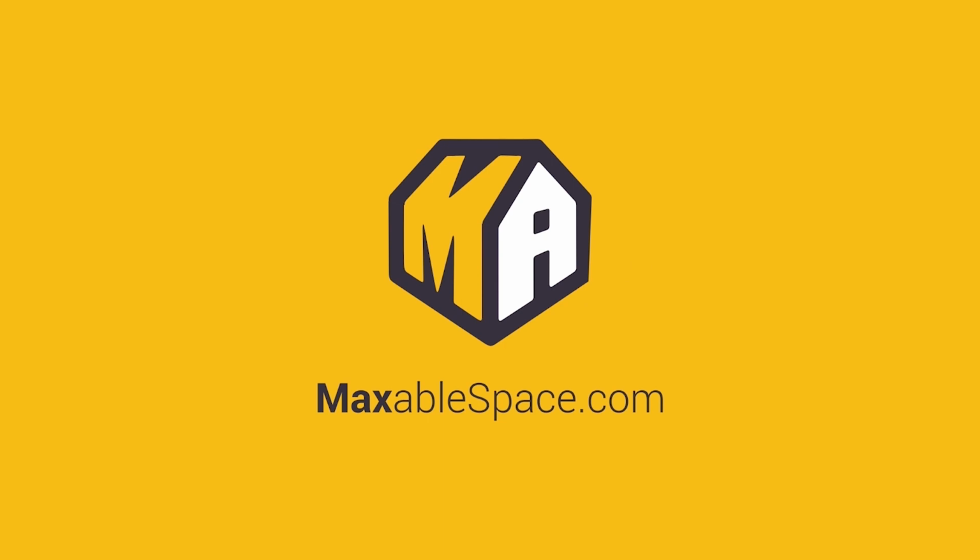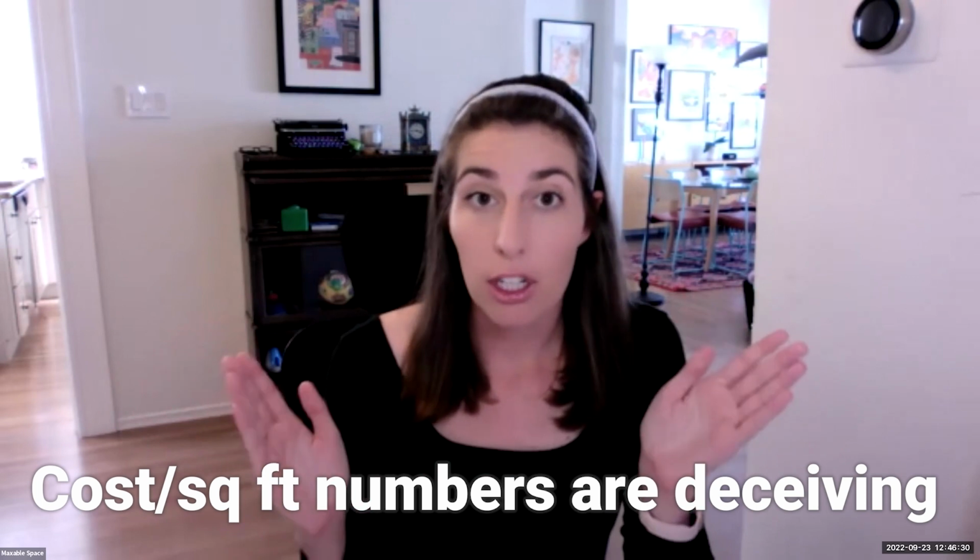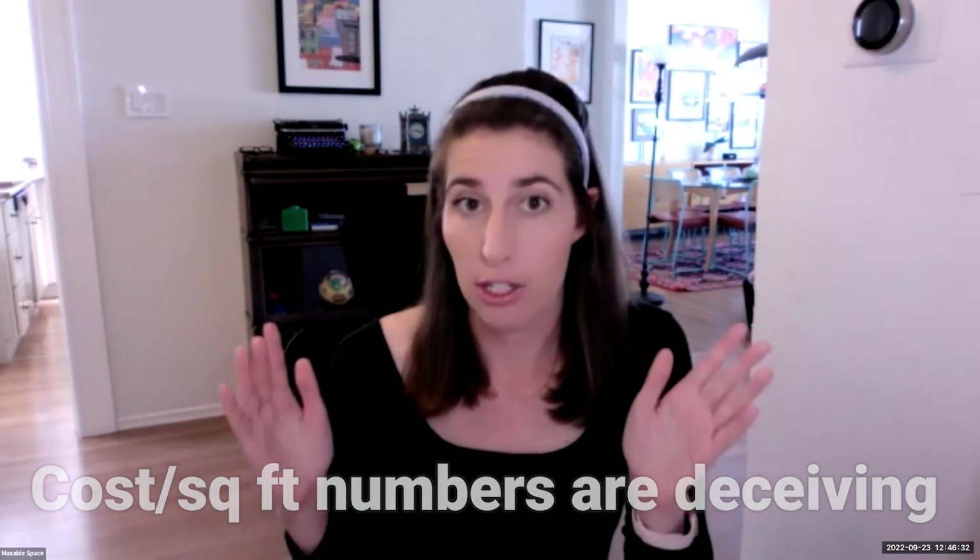Now, I'm going to start off by explaining to you why I hate cost per square foot numbers and why they're generally a terrible indicator of cost for an ADU project. First, when you're looking at ADU projects, your cost per square foot numbers can be wildly variable depending on the size of the ADU that you're thinking about building. So, for example, if you build a 1,200 square foot ADU, your cost per square foot is generally going to be a lot lower than if you build a 400 square foot ADU, your cost per square foot is going to be a lot higher.